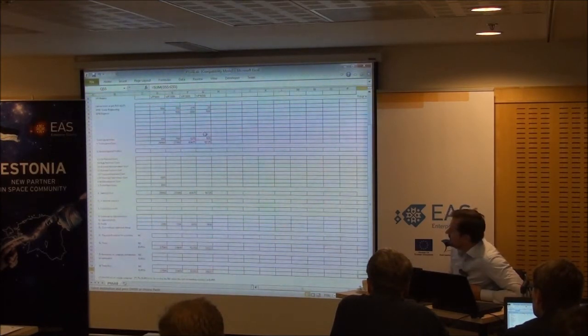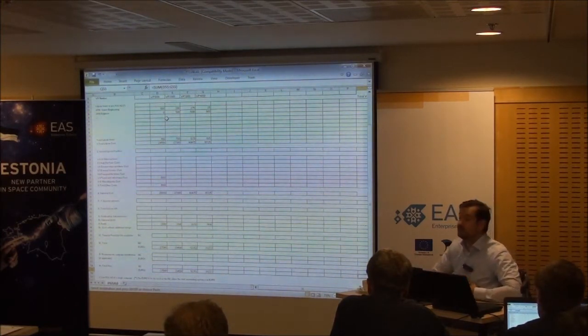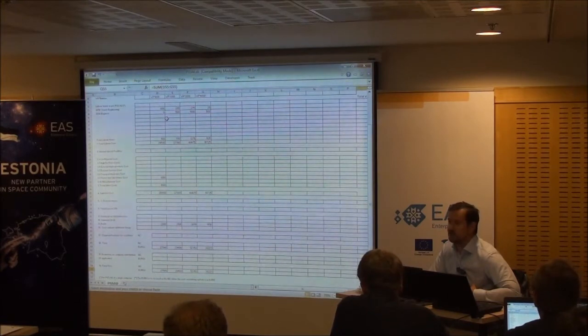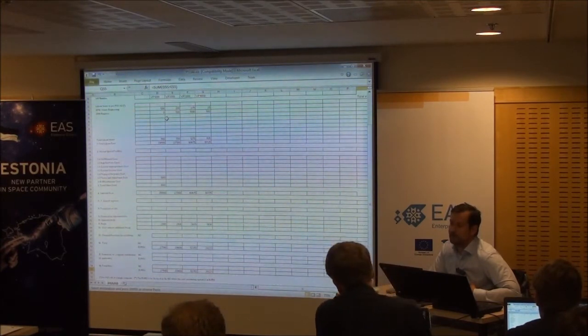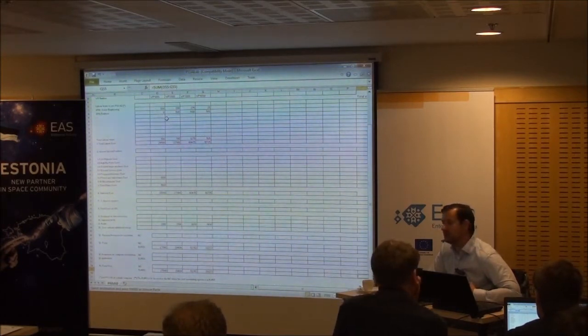To be honest, if you're confirming a firm fixed price piece of work, and you put 2,000 hours or 3,000 hours, and it costs 2,000 or 3,500 hours, that's just your problem. That's the whole nature of firm fixed price. The only reason they put the hours there is not because you're confirming that's how many hours you're actually going to do, but as a way for ESA to determine, have you judged the necessary effort correctly?